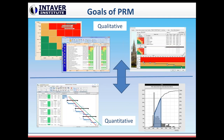I'm going to go a bit into the weeds here — and even though I said I wouldn't go too much into the software, these are standard views you'll see out of our software or similar packages. On the qualitative side, we're assessing and prioritizing risks to see which ones will have the biggest impact. On the top right corner there's a mitigation plan with various steps that will reduce that risk over time. On the quantitative side, one of the things we can do is get a risk-adjusted plan.